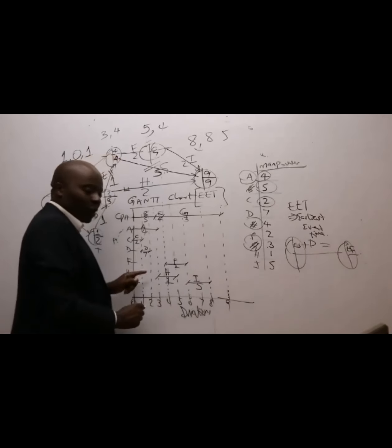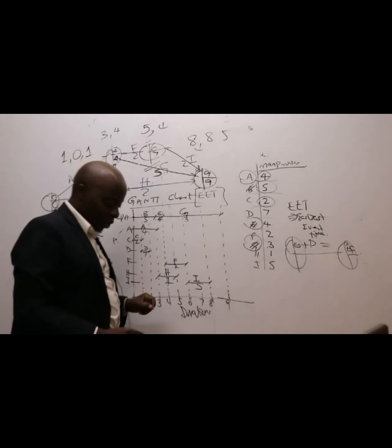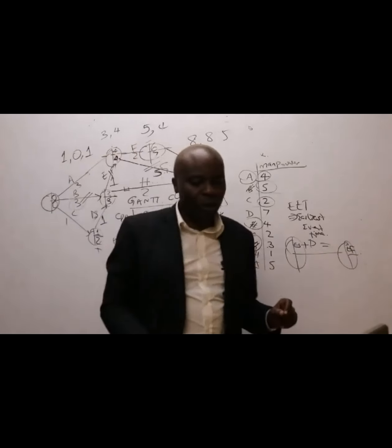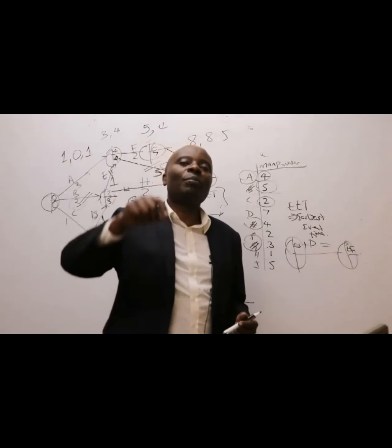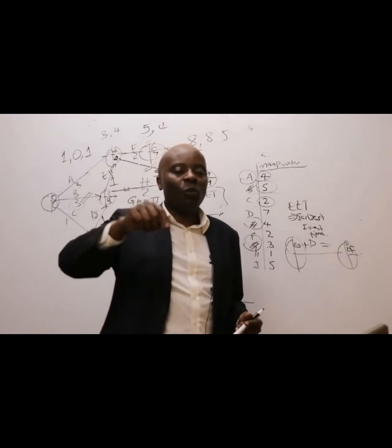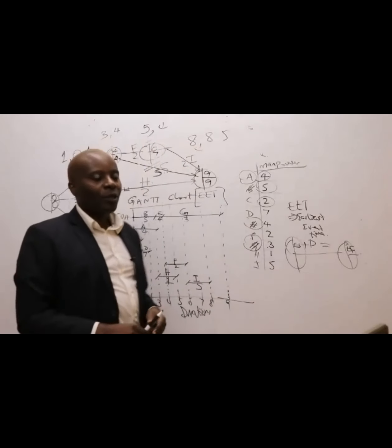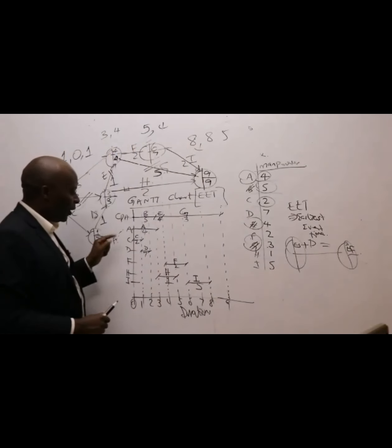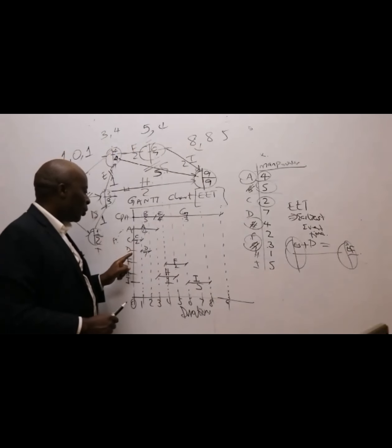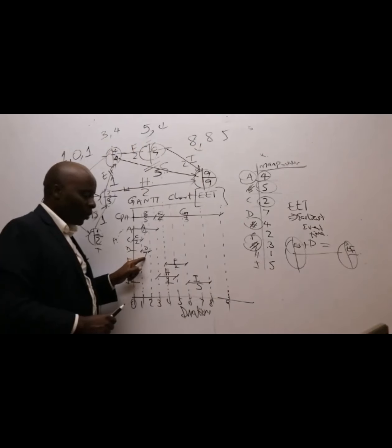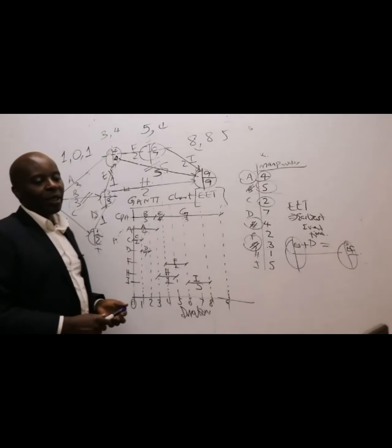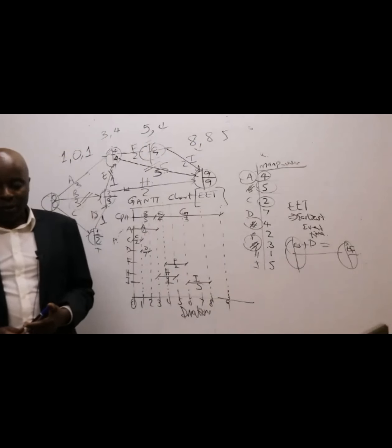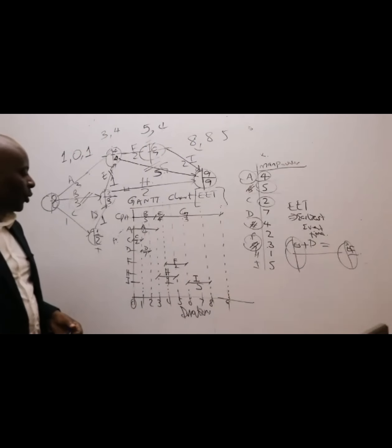Please make sure that you post the number of workers in your Gantt chart, because a Gantt chart, by definition, is a calendar of events that shows manpower, that shows human resources. So calendar means time. If I'm given a Gantt chart like this, I'll be able to know D will start from where to, and it needs how many workers? 7 workers. So please draw like that.